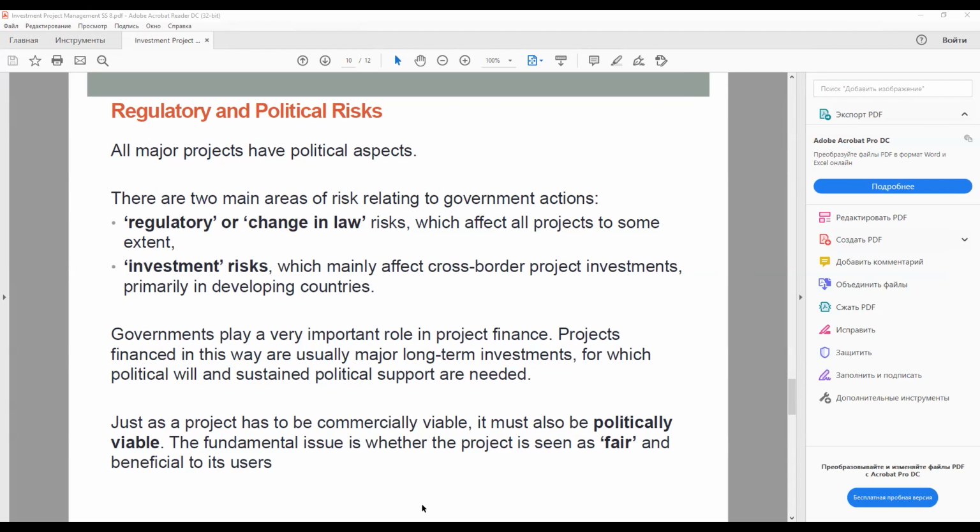Project finance investments are especially vulnerable in this respect. The high leverage means that there is little room for a project company to adjust to short-term macroeconomic and other problems in the host country. A fixed amount of foreign currency debt service always has to be paid irrespective of how difficult it might be for the host country. Whereas a project with a much lower leverage has the option to reduce its dividends, and hence relieve some of the stress on the host country's economy.